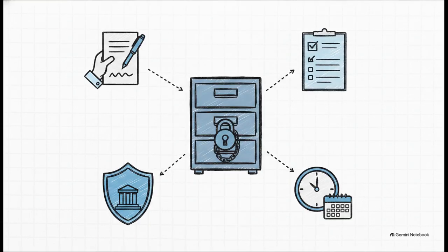And then there's step 5, documenting the process. Listen, establishing a process doesn't just mean making up rules. It means detailing exactly who is required to document the communication, the required format it has to take, how it's stored, and, this is a big one, how long you're required to keep it for compliance. Seriously, this is how you protect yourself and your project both legally and operationally.